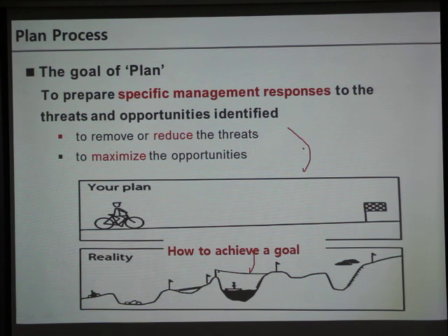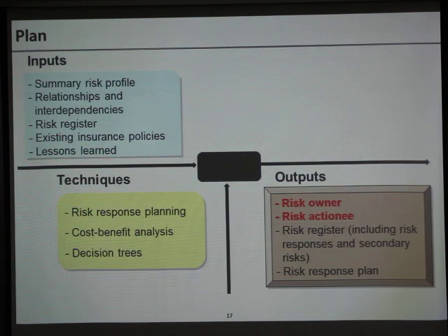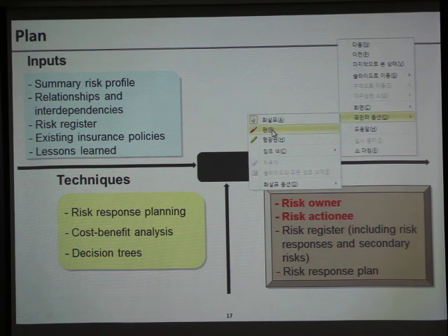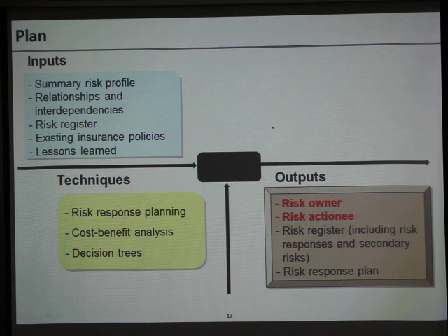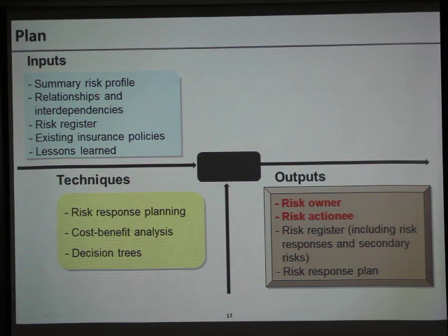Minimizing threats and maximizing opportunities can be one of the major targets when we manage and control them. In the plan step, one of the important outputs is to identify the individuals responsible for the response actions and the overall ownership of each risk.